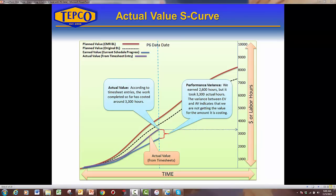Here's the same graph with the actual value added. You can see a variance between the actual value and the earned value as of the data date — these indicate the CPI, which gives us the performance factor to determine how much more the project may cost. The actual hours are higher than earned hours, and the earned hours are below the planned value. With earned below planned and actual higher than earned, this is the worst case scenario a project could be in.